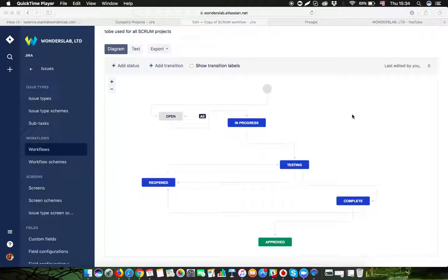Only after user acceptance testing has confirmed that a story or feature has been implemented according to the definition of done can a product owner take a look at what was delivered and check whether it's his vision, whether the development team was able to implement the vision, or whether the vision has changed.